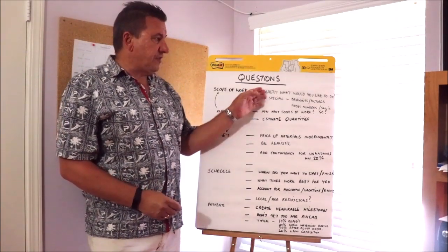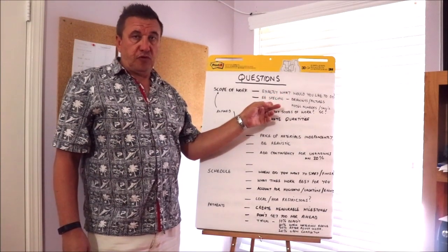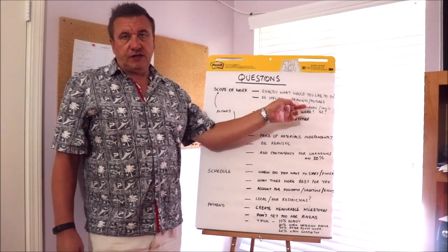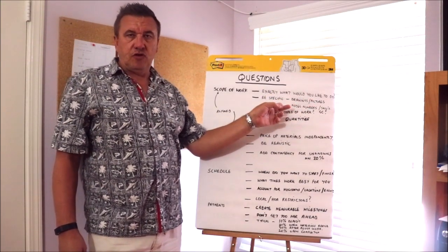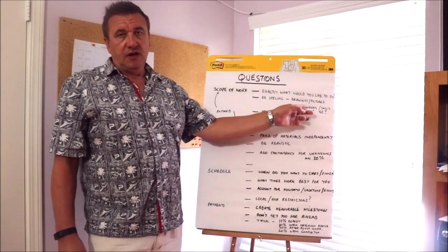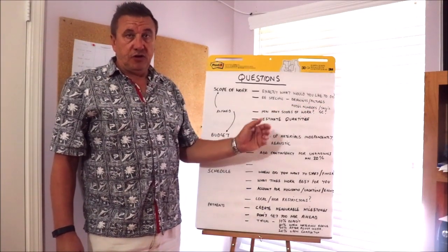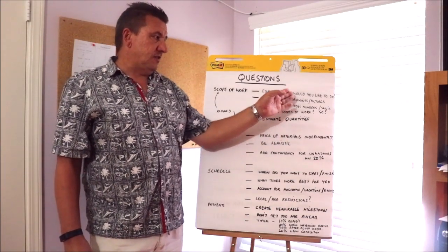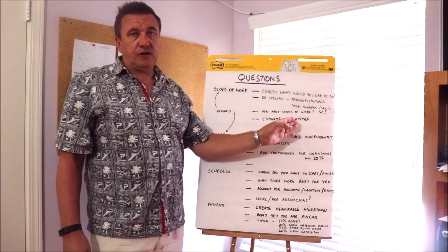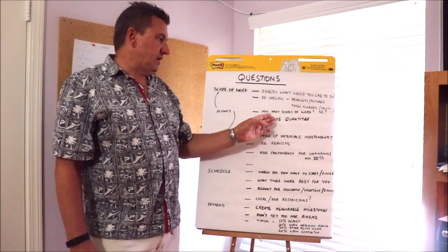So the more specific that you can be, the easier it's going to be for somebody to bid on your project. When I talk about specifics, if you have drawings, if you have pictures, make sure that you know exactly what you want, even down to details like model numbers and SKUs. If you have something at Home Depot and you know the SKU of it, write it down and say, this is what I want, so it's going to be easier for the guys to bid on. Because what we're trying to do is create a bid document that people can put price into.